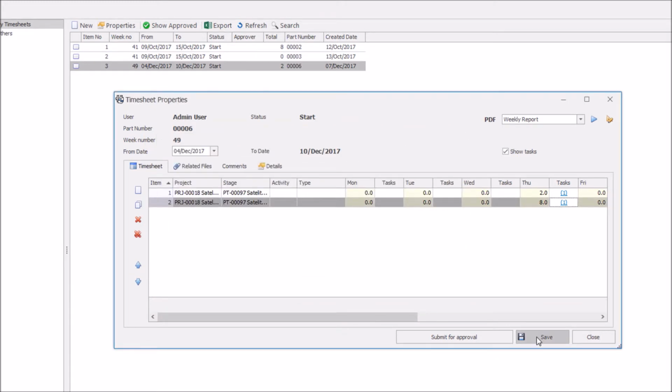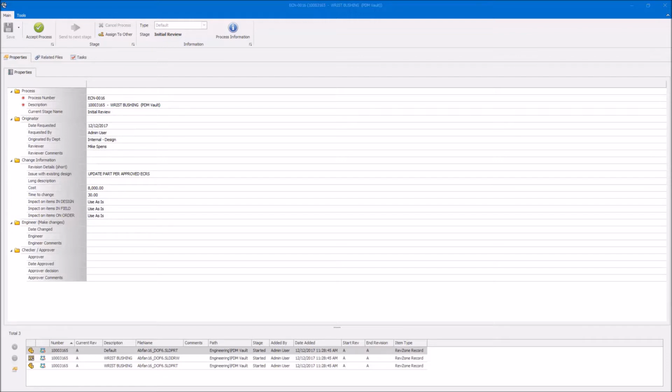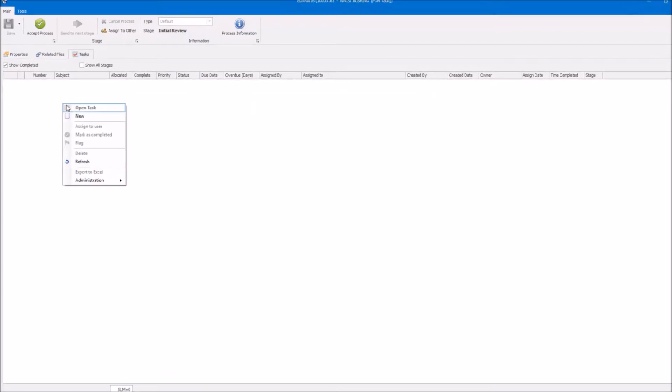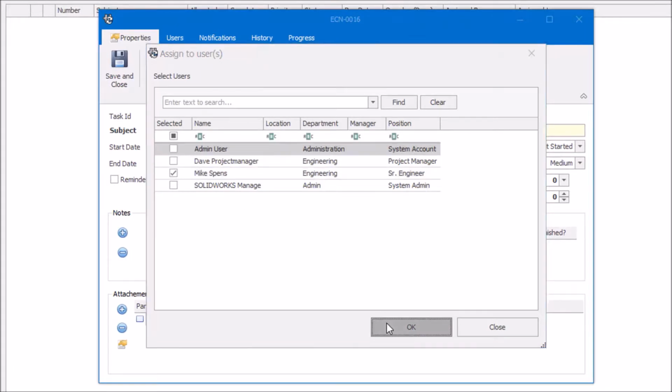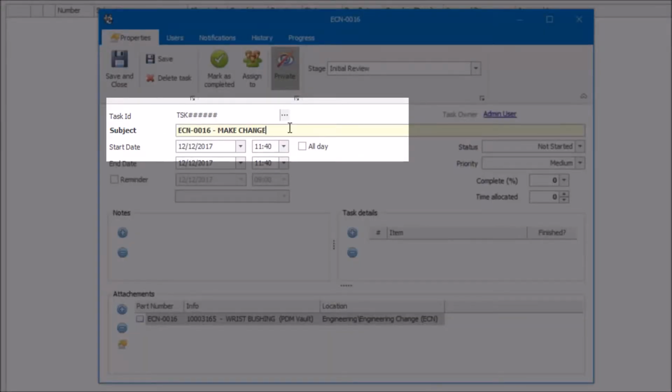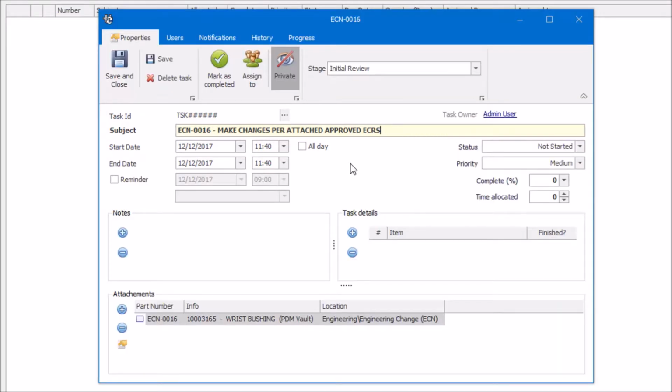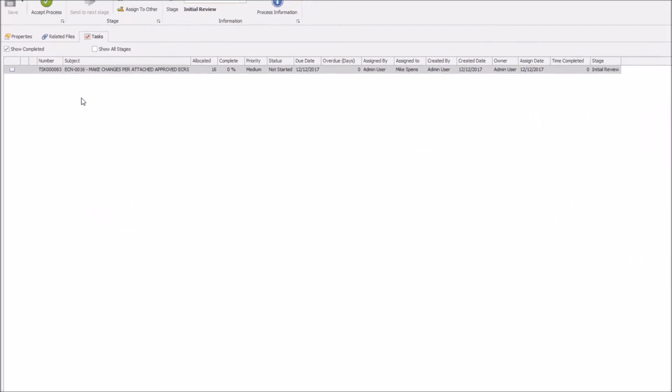Consent for approval. Tasks are everywhere in SOLIDWORKS Manage. Include processes. It's not like data entry. In SOLIDWORKS Manage, processes will drive the tasks of the project. So when a process gets done, it will automatically update the project progress. No need for manual entry of data.